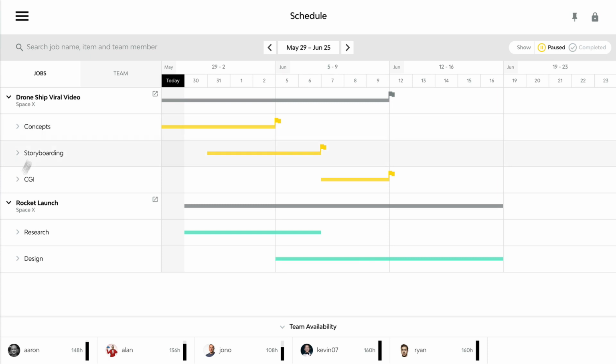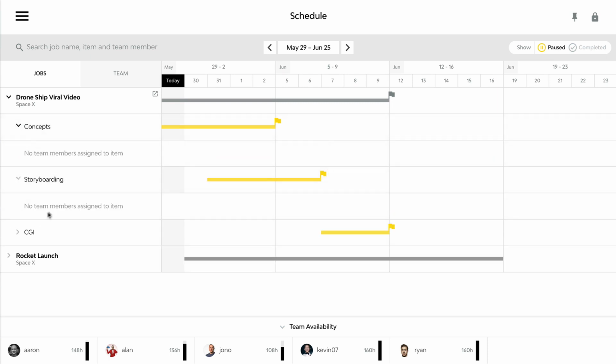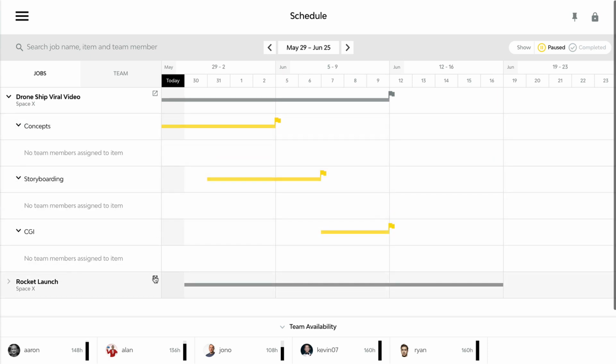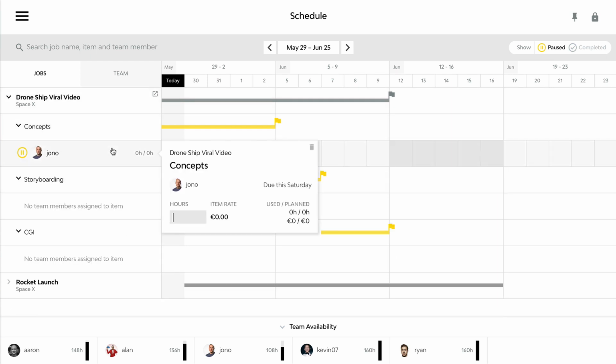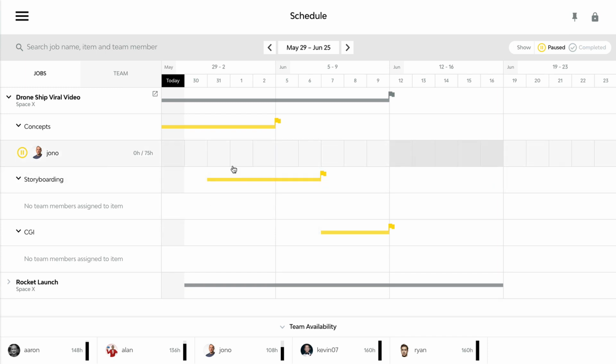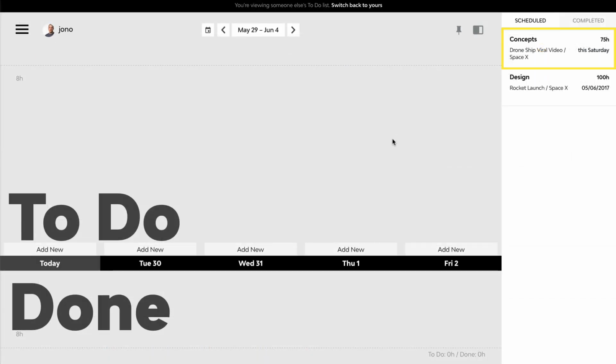In the case of the viral video job here, we have no people assigned to these. So in this scenario, I want to pick up my team. In this case, Jono, he's going to be working on concepts, and I can just drag and drop him onto the item like that. Now I can specify how many hours I want him to spend in total on that particular item, 75. I can put it into play, and at that point, this item is now visible over on Jono's to-do screen.